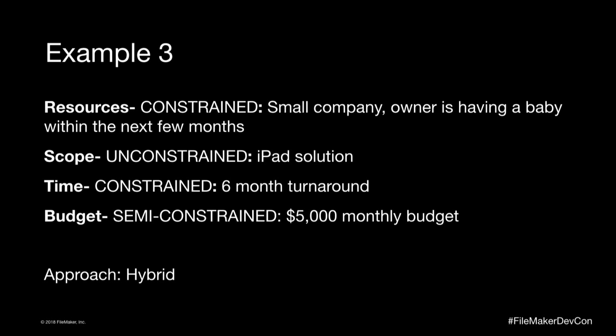And so that's already lending ourselves for the build to be agile, because we're going to build in sprints, so probably 2-week sprints, so we'll have 2 sprints every month, and we already know that the total amount of chunk of work that we can take on is exactly $5,000 worth. So we can separate our project into $5,000 chunks and deliver in monthly fashions until we get the full system rolled out.